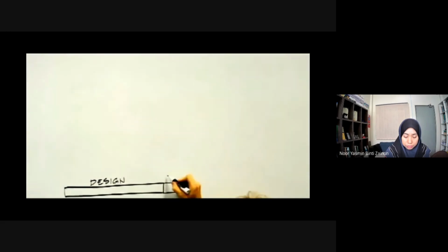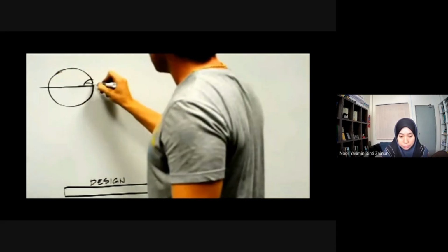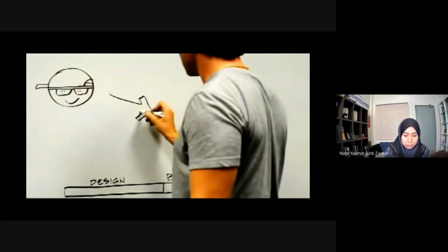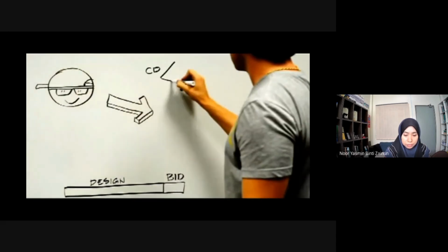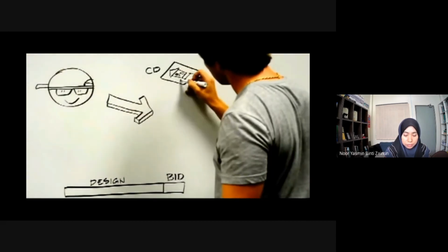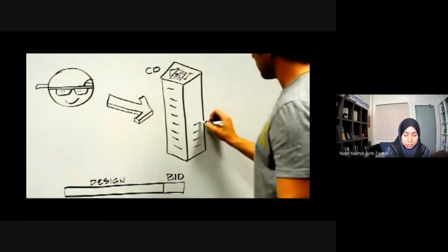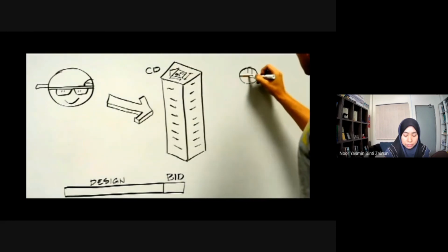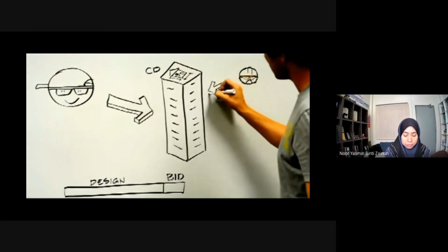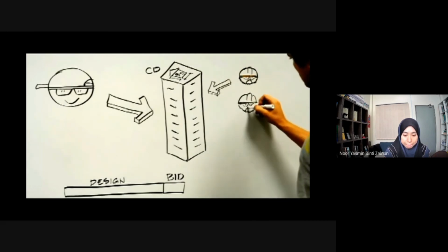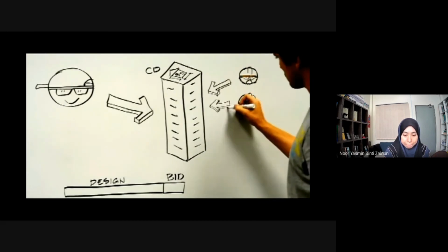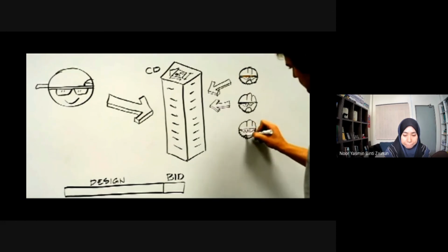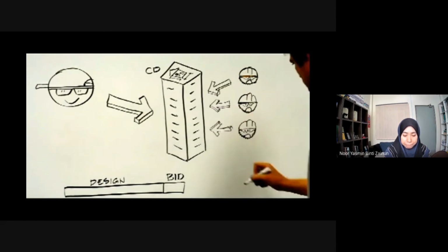During the bidding phase, the owner, along with any professional assistance they might have, obtains competitive bids from a given number of qualified contractors based on the CDs completed earlier in the process. Each of the builders obtains a copy of the CDs, which is then either fully priced by them or split by subcomponents such as foundations, structure, electrical, and priced by their designated subcontractors.